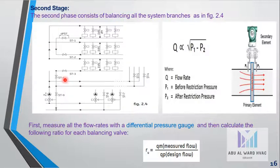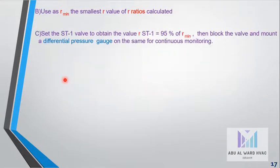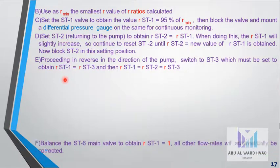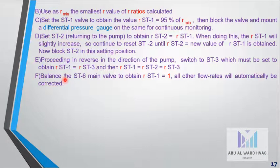When we reach this stage, there is one important step: to balance the ST6 main valve to obtain R_ST1 = 1, so all other flow rates will automatically be corrected. The branches of all other columns can be equally matched.